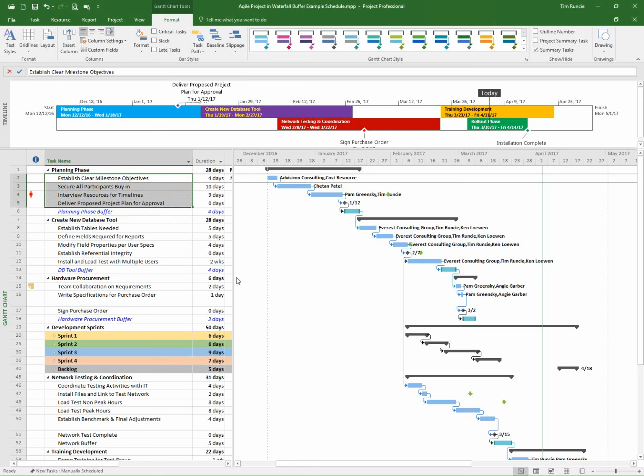That means when a technical resource tells me it's a week, they know it's going to be a couple of days, but they put their own padding on there. I get it as maybe the project manager. I add my padding. I throw that up to my program manager, my sponsor. They add their padding. The executive goes to the customer, or the sales rep goes to the customer, and they've added their padding. And what we've done is we've padded ourselves out of a job or out of a contract, or we really don't have an accurate estimate. So what we want to do is surface that, not beat people up for having padding there, but make it visible.